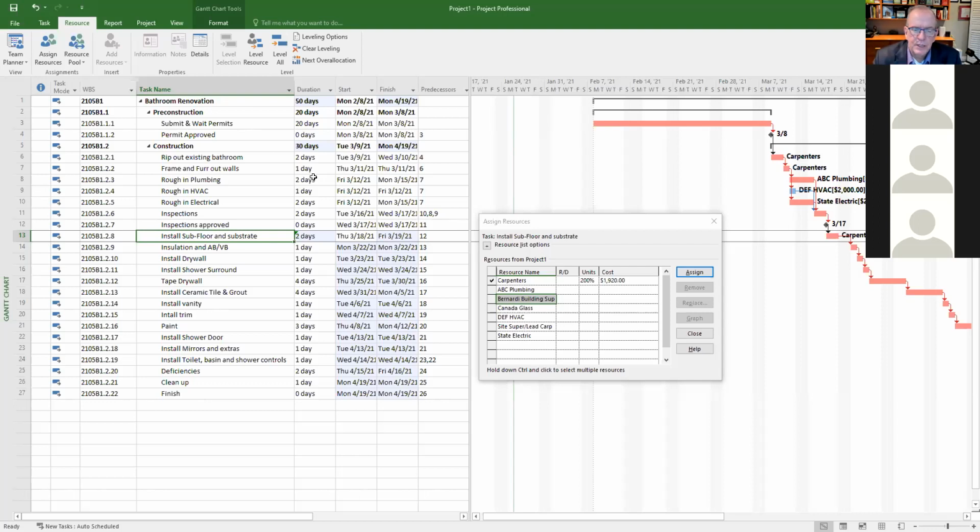But as we talked about earlier, it also depends on the physical space that has an impact too, because, all right, using that logic, then I could add 2 more people. And instead of it taking a week, it would only take 2.5 days. So now I got 4 people, 2.5 days. Well, if I had another 4 people, so that'd be 8 people, it should only take 1.25 days. So if I double that, 16 people, that should only take 5 hours. If I double that, 32 people, that should only take 2.5 hours. If I double that, 64 people should only take 1.25 hours. That doesn't make sense, right? So you gotta be a little bit careful with that. It makes sense up to a point.